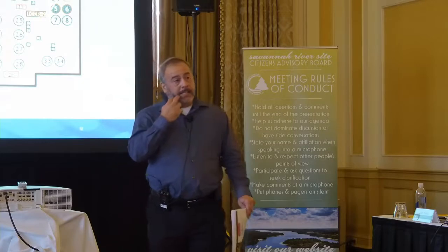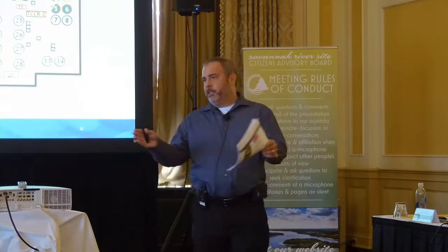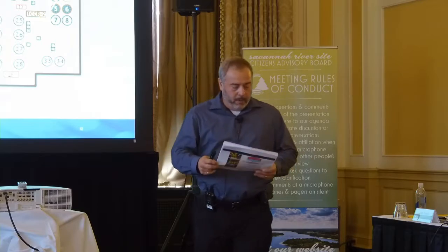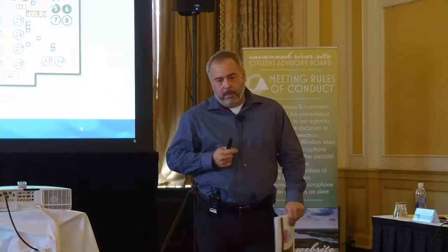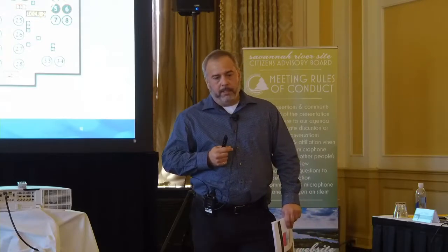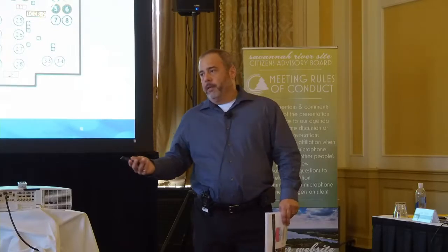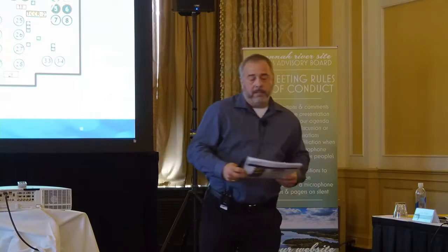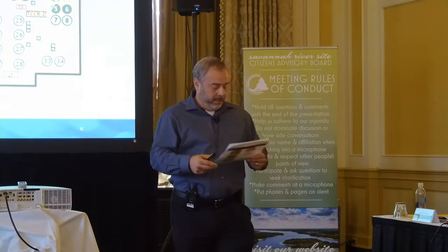We have to expand that interim safe storage facility. It's got space right now for just the initial 4 columns. So that's in the design phase right now, where we have to go back, and because we have new material that we're going to process through TCCR, we have to analyze our safety basis for that new material, since it has not been analyzed yet. So that's all in process right now. We're doing a DSA review, to see how much exactly has to be changed.